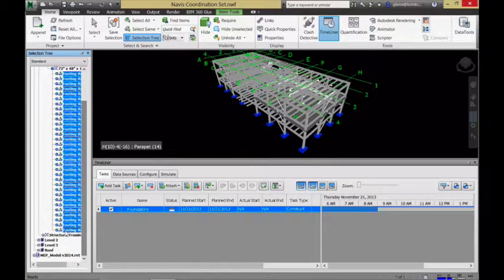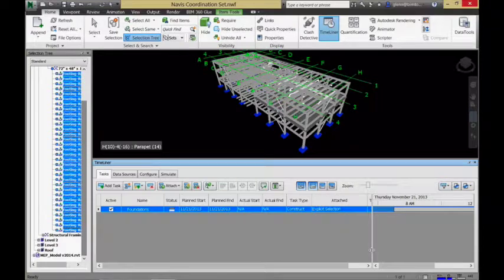And what I actually do is just drag them right on top of the task. And now all those little blue foundation elements which are hanging around over here are now associated with that task. So the principle about what's going on here is really pretty simple. Tasks times pulling all the things together, making it happen. That actually is not so hard to understand.